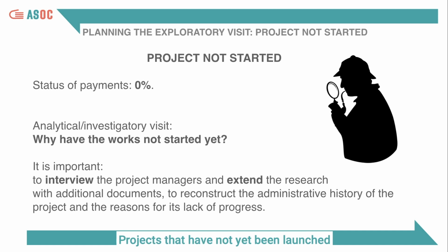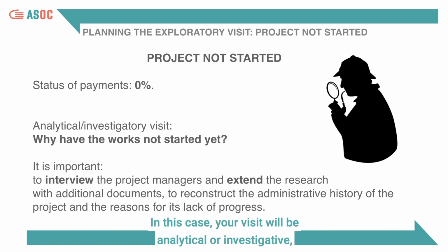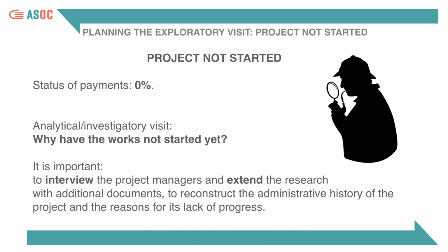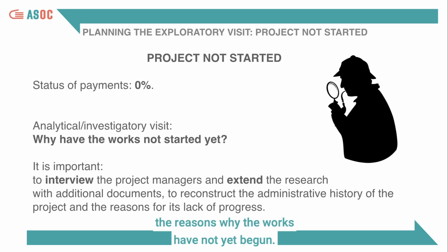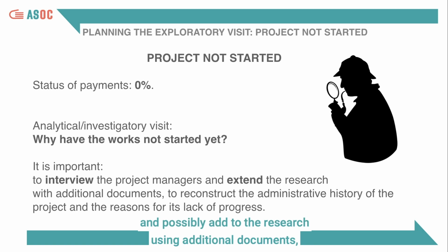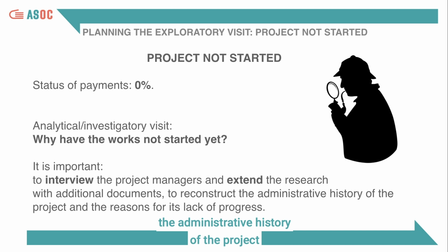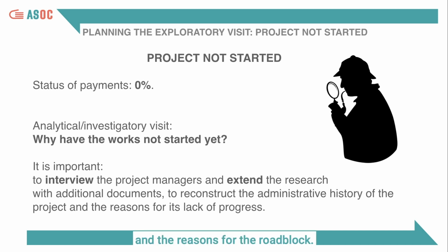Projects that have not yet launched are those for which the payment status is still at 0%. In this case, your visit will be analytical or investigative. Namely, it will be aimed at ascertaining the reasons why the works have not yet begun. It is therefore important to interview the project managers and possibly add to the research using additional documents, articles, or information that can help you reconstruct the administrative history of the project and the reasons for the roadblock.